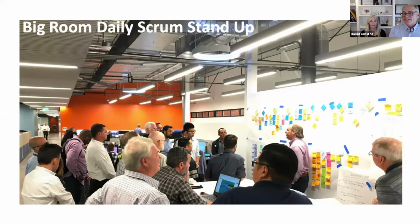Really, the idea behind these daily stand-ups is very similar to the daily huddles. It's not so much whether everyone got everything accomplished that you expected, but is anyone being held up? So it's more of an exceptions approach. Is anyone being held up? If so, what is it? What do you need from us? Number 2 is, what can make us go faster? Those are really the 2 things that get asked. Anything you want to add to that?